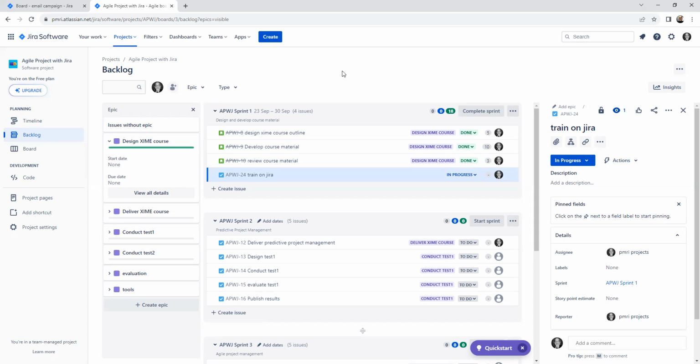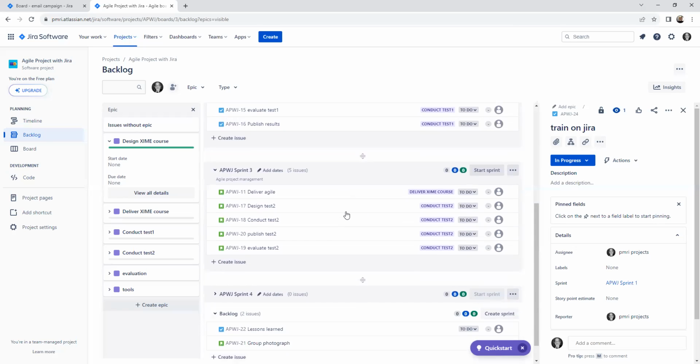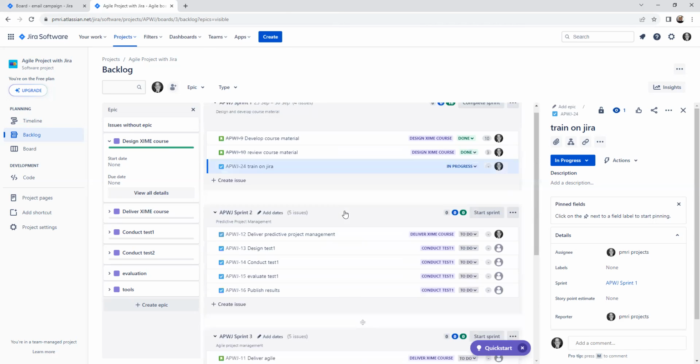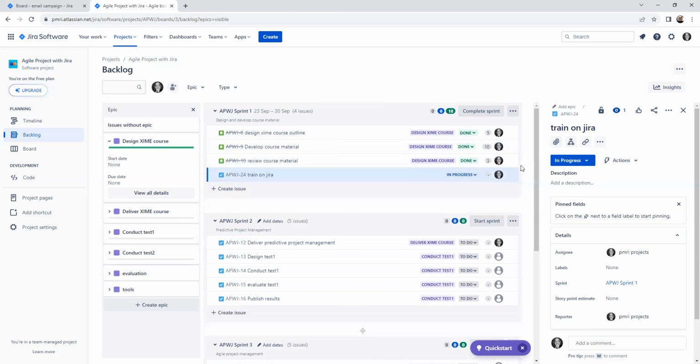So click on it, you can go and learn Scrum there, and then come back to this tool. Always start with epics, then stories, then tasks, then story point estimation, then define the sprints and group your backlog into sprints and start a sprint.